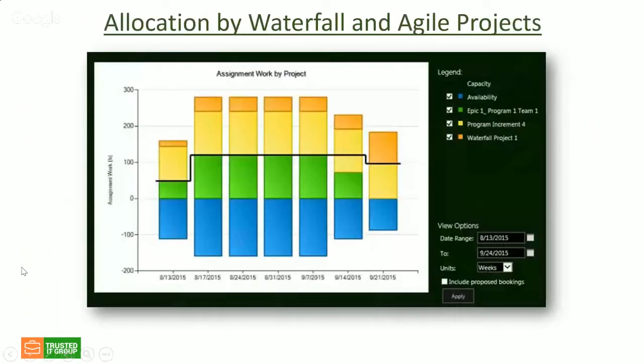As far as resource management, you can see on the right side we selected some of the folks to understand what their availability and assignments are, and we see that the teams are overbooked by about 2.5 times or almost 3 times over this particular period of time from August to September. We should probably look at the future, but that was set up in August. Anyway, the picture is telling us that teams are overbooked, and we can see these are the projects.